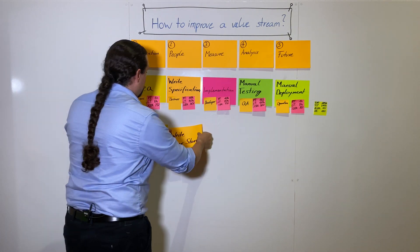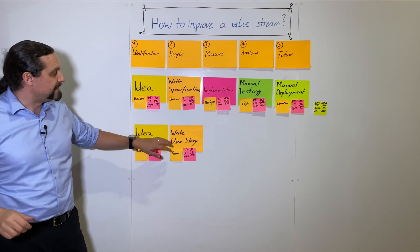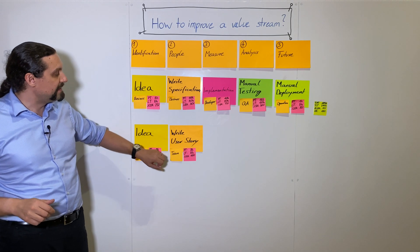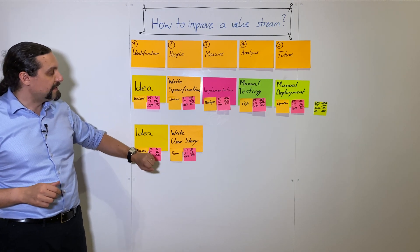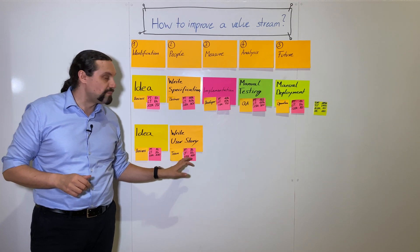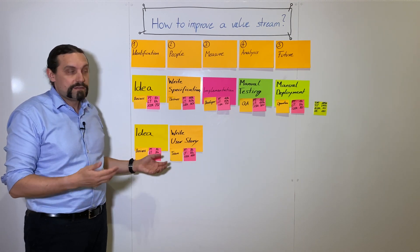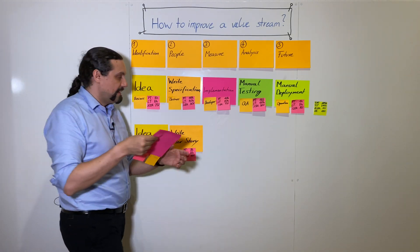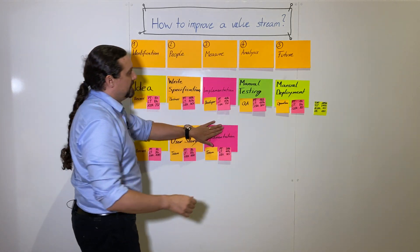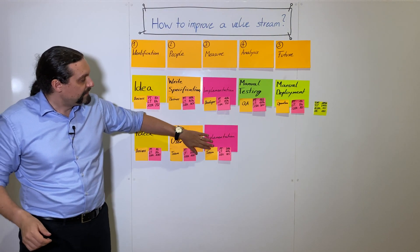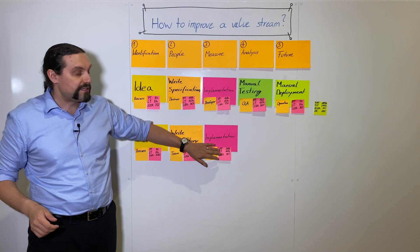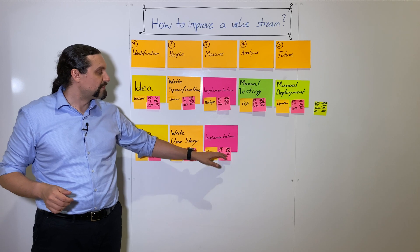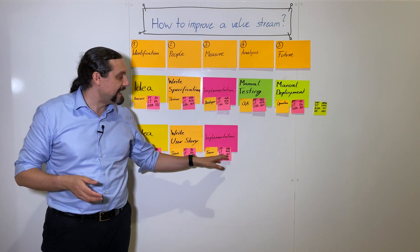We are going to no longer write specifications — instead we are going to write user stories, and this will be written by the team, with a process time of eight hours, lead time of eight hours, and a target percentage complete accuracy of 100 percent. We don't want to have any rework in our target system. Then we have the implementation step — again the team does this, with a process time of 20 hours, lead time of 40 hours, and percentage complete accuracy of 80 percent.